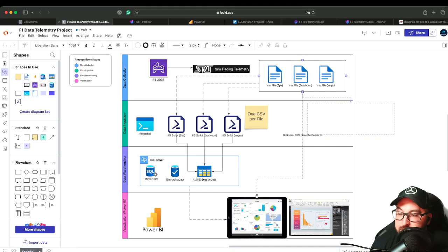That means that technically speaking, the Power BI work, and we talked about this a little bit earlier, can actually start while all of this is happening. And so that gives the data ingestion and data warehouse phases a little bit of breathing room, and it also allows the BI development to start as soon as possible so that both sides can keep working. There's lower pressure.